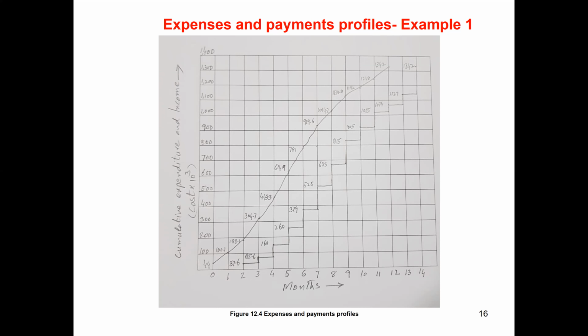So the S curve, we are always going to draw based on the bill of quantities, the cost of the project. From that, we are going to know about our planning and the actual construction, whether we are going to do it faster or our actual construction will be slower than what we have planned and what we submitted in the S curve at the time of bid submission. So in this way, the project managers can control the cost of the project. So with this, gentlemen, we have finished this chapter, how to develop the S curve for the project, which means we have finished chapter number 12, and inshallah next time we will talk about the next chapter.